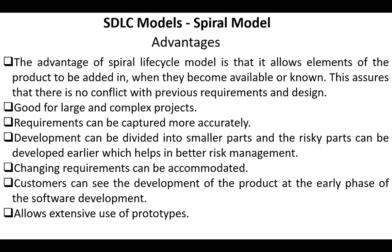The main advantages of the spiral model are: it allows elements of the product to be added when they become available or known, which assures that there is no conflict with the previous requirements and design. It's good for large and complex projects. In this model, requirements can be captured more accurately. Development can be divided into smaller parts and the risky parts can be developed earlier, which helps in better risk management. Changing requirements can be accommodated. Customers can see the development of the product at the early phase of the software development, and the spiral model allows extensive use of prototypes.